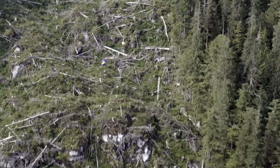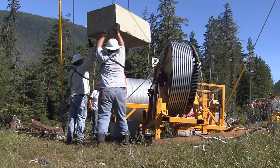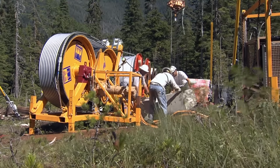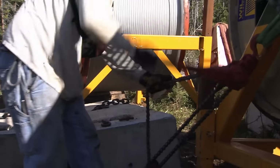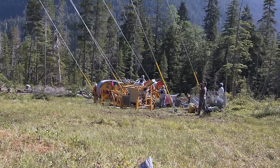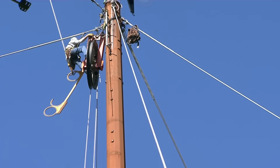Crews are flown onto the route, and the pullers and tensioners, if not already located, are flown in and assembled. They're then weighted and tied down to whatever can be found to be able to handle the tremendous tensions that they'll need to achieve. They need to achieve line pulls normally assigned to huge puller trucks.